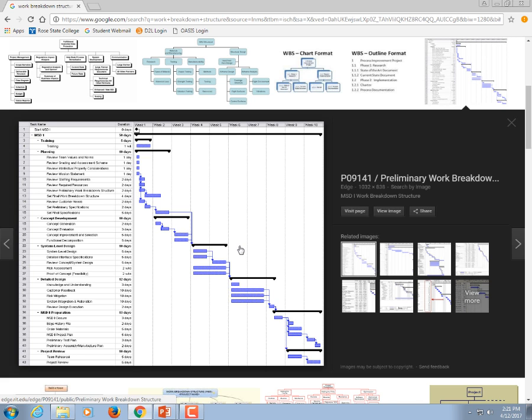I mean, probably the concrete to build the frame. Then once you get the flooring in, you can start building the 2x4s, and you don't really want the shingles until after the rafters are up. So that's how you build these things. You keep adding the components on there, okay?